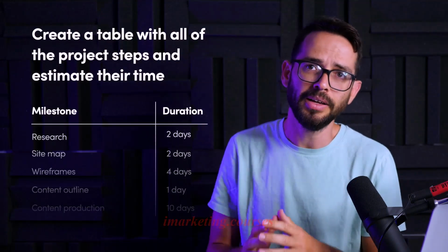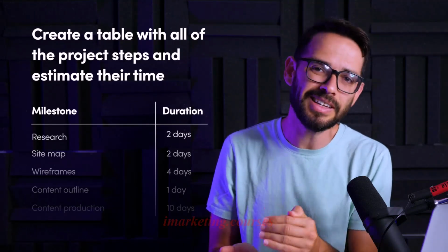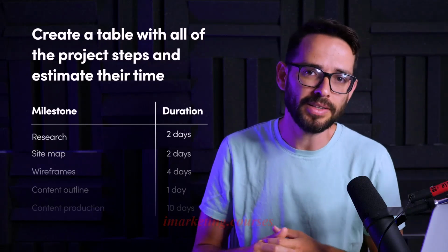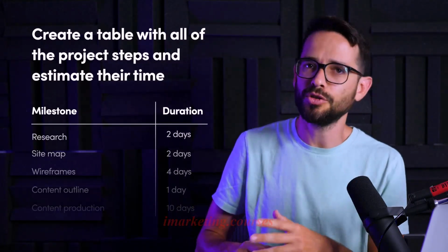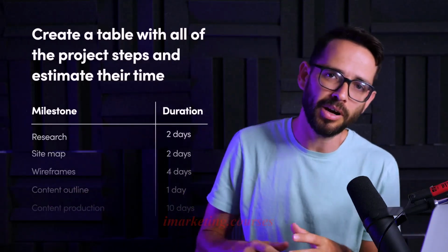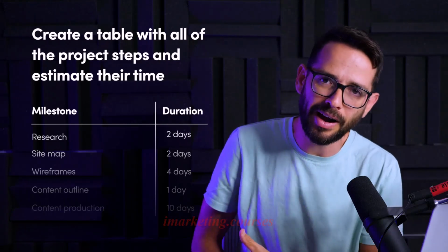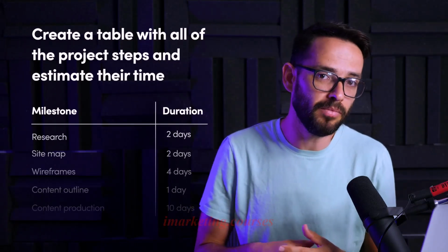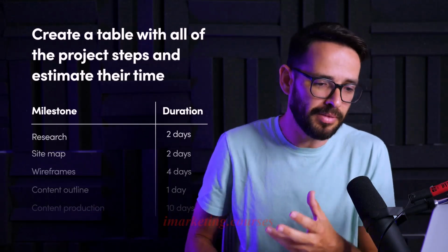And you do this by starting to create a basic table. In that table, you're going to list out all of your efforts and you're going to try to price them. Some of them are going to be priced by time, meaning research might take me 2 days and doing the site might take me 2 days. And for me, 2 days is X amount of hours that I'm working on this. Some things might be charged not by time, but by actual money.